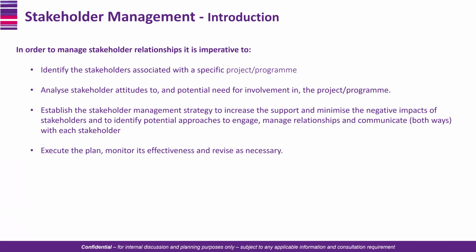Okay, so one thing we need to do, in order to manage a stakeholder relationship, it is imperative for us to first of all identify the stakeholders. Then the next thing we want to do is to analyze the attitude of the stakeholders. When we're talking about the attitude of the stakeholders, we want to talk about what exactly is the power and the influence, or interest, of this particular stakeholder on this particular project.